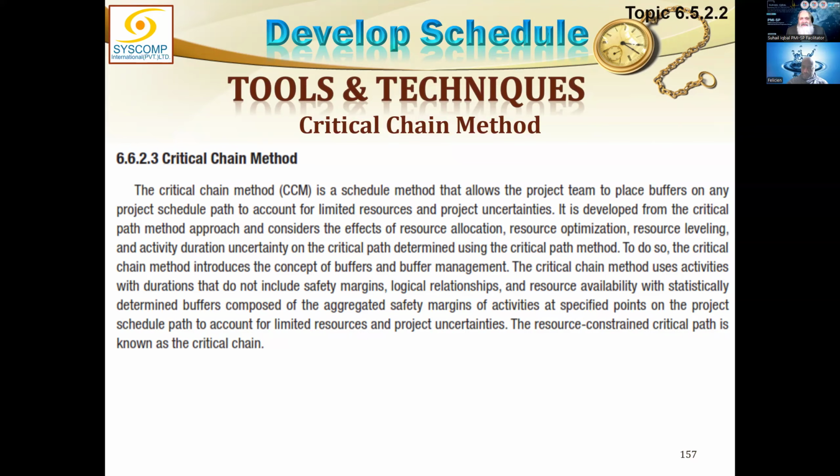So, practically speaking, I am asking you to attack the critical activities only, apply critical chain on them, and that means you will be allocating activity buffers to all the critical activities, thus making it possible for the critical path to end in 80 days. Moreover, what about the other paths?